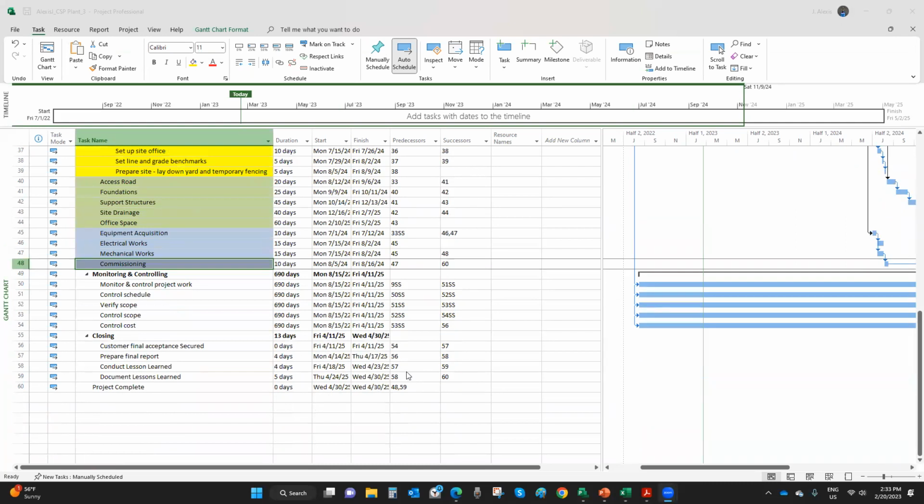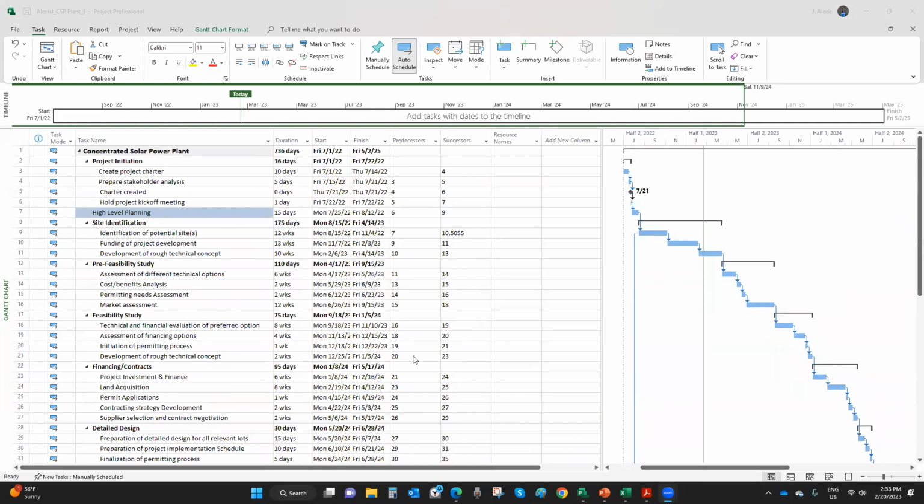Now, another way to check is to import your data into a software called Primavera Risk Analysis, and you perform a schedule check. The schedule check will tell you you have these issues with your schedule, and you should check your linking or task relationships, because it appears that those items should have predecessors, successors, but they do not. And unless it is a summary task that is linked by subtask, you should take care of it. So two ways to do that.